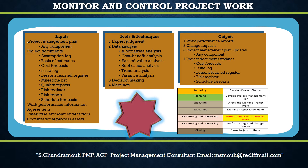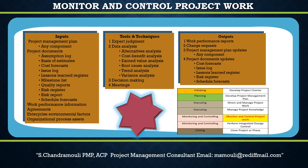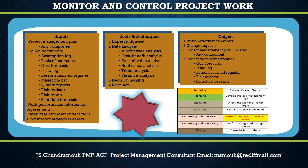The next output is Work Performance Reports. Work performance reports are the physical or electronic representation of work performance information compiled in project documents, intended to generate decisions, actions, or awareness. Note: all controlling processes create work performance information as output; only this overall controlling process creates work performance reports as output. The input for this process is work performance information from various controlling processes, collated to create the work performance report.